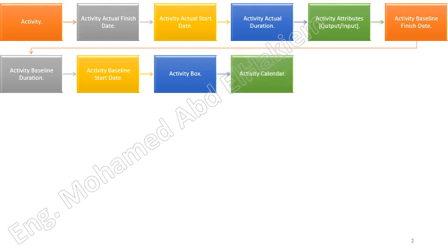Activity calendar. Usually the project calendar, or another specifically defined calendar from the calendar library, assigned to the schedule activity which defines the work periods and non-work periods in calendar format. The activity calendar, on the schedule activities to which it is assigned, is used to replace the project calendar during schedule network analysis. See also calendar library.